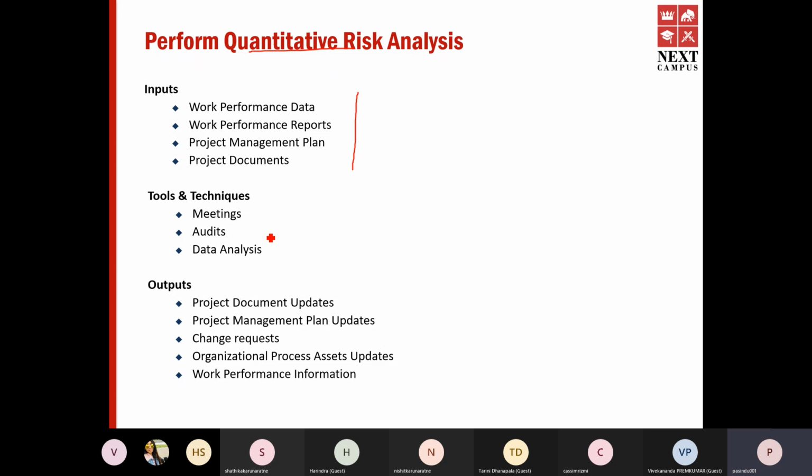accepting a CR. So first thing is that you would log a change request, that you identify, okay, I need to do this change. Once you identify the change, you need to understand the impact it has on the project. What is the cost impact? What is the timeline impact? Those are the two main impacts which you need to discuss with regard to the client.